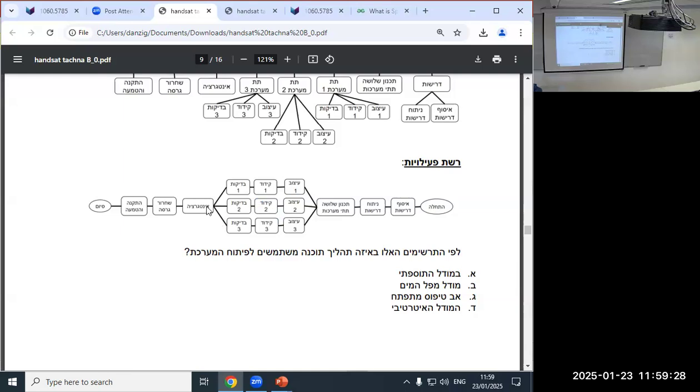But in either case, I'm not going to start the integration until I've finished the 9 weeks. So essentially, I do have separate compartments that are going to finish at different times. I start them all at the same time, but this module will finish after 3 weeks, this one 3 weeks later, and this one 3 weeks after that. So I did divide the system into different modules, and I did plan them to finish at different times. And incrementally, the system will get built. So it makes sense, oh, it's incremental.